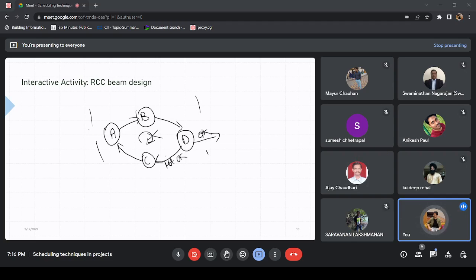For breaking it, you need to find some tear mark or where you can tear it. And here in this example, we determined that we can tear this, right? So I hope you get an idea of tearing. Now what is happening is that in C you are assuming some material and dimension properties. Then you are calculating your dead load. From that dead load, you are doing some analysis. From analysis, you are coming to design check, and your design is okay because your assumption here was very good, so you move forward, right? Now it's not a loop that you have to be worried about.